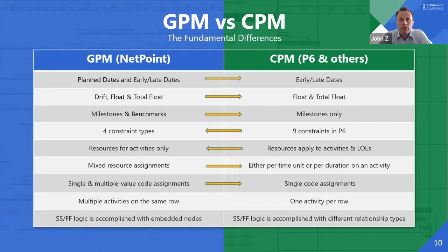The next one is benchmark, which is a NetPoint only kind of activity type. Obviously in P6 you have milestones. Not a big deal, because when it comes across, it'll come across as a constrained milestone in P6, and we'll see that in the demo.